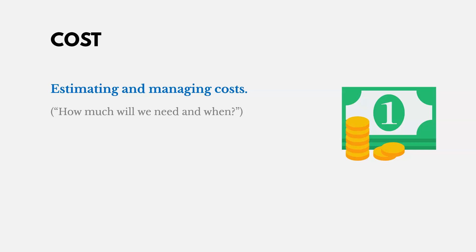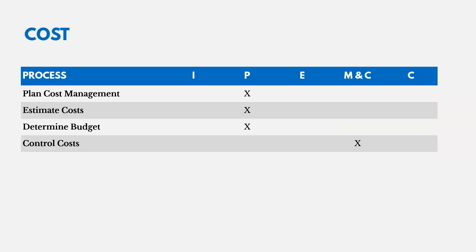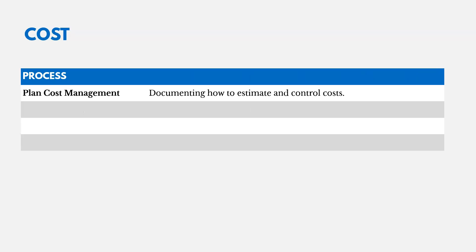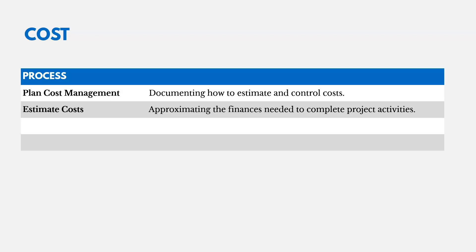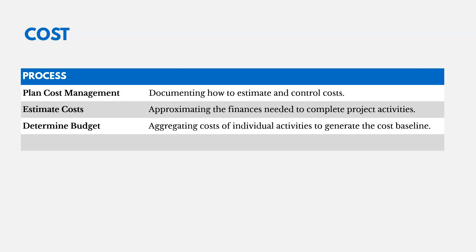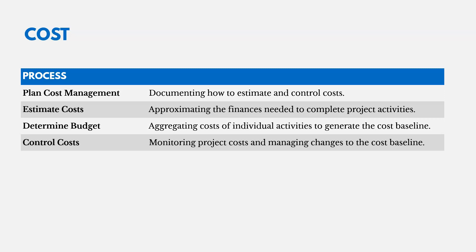Cost management involves estimating how much we'll need and when. There are four processes — three in planning and one in monitoring and controlling. We plan cost management, documenting how to estimate and control costs. We estimate costs by approximating the finances needed, going by activity costs. We determine the budget by aggregating those activity costs to generate the cost baseline. Then we control costs over time by monitoring project costs and managing changes to the cost baseline.